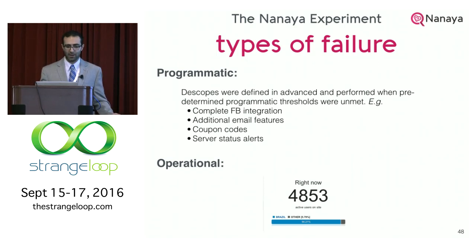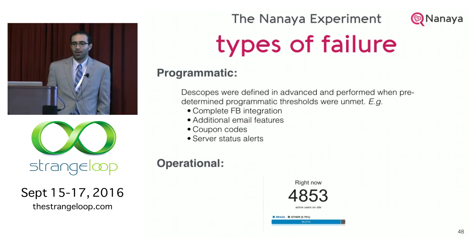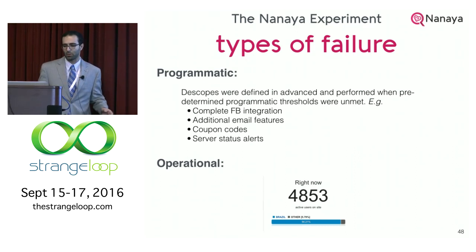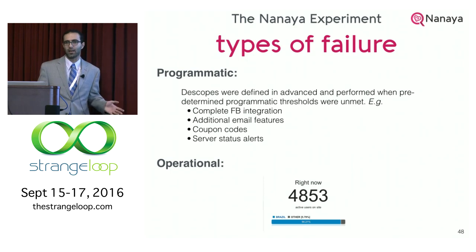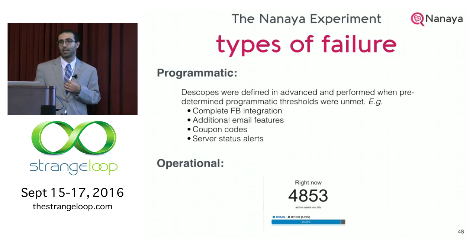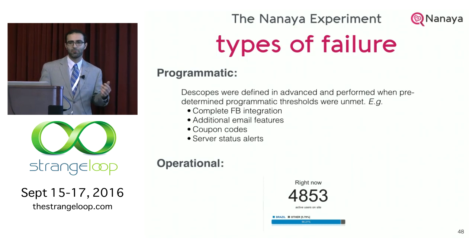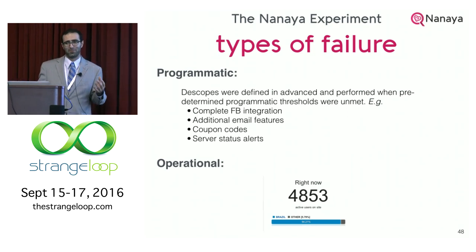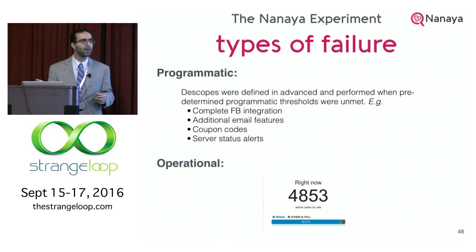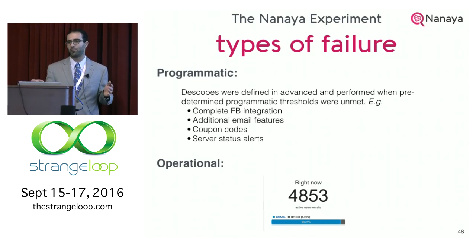Of course there's failure — and I think that's the most important thing. The point is that we planned our failures. We said we're not going to close on our budget, we know that, but maybe we'll have some things ahead of schedule. Things not on the critical path that we saw we weren't going to get to — we said drop it, don't think about it. Some devs were upset, but it's about mission success. On the operational side, I woke up the second day after launch to find a lot of people in Brazil accessing the site — far more database connections than we'd planned for. We'd actually said if this ever happened, we'd just party and forget about it. What happened was we predicted it and fixed it — an operational failure we'd sort of planned around.